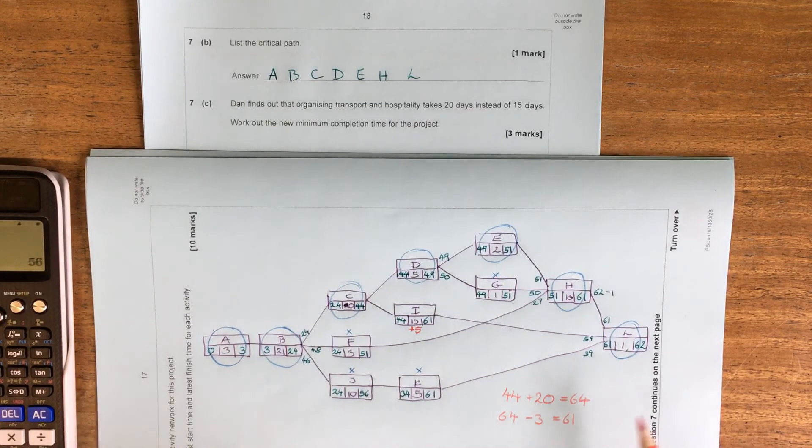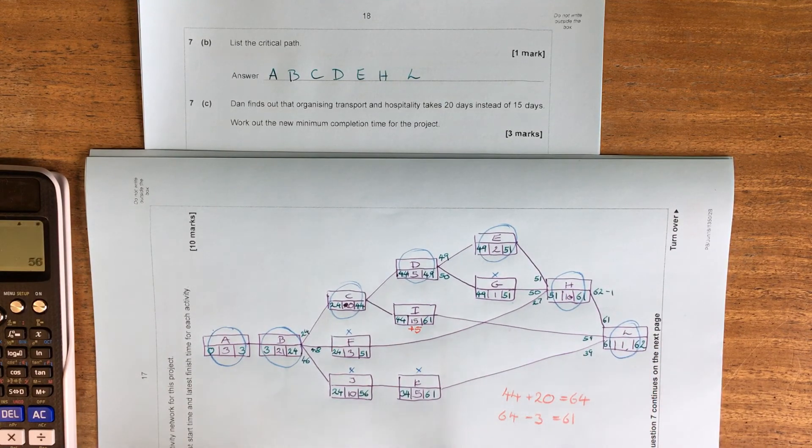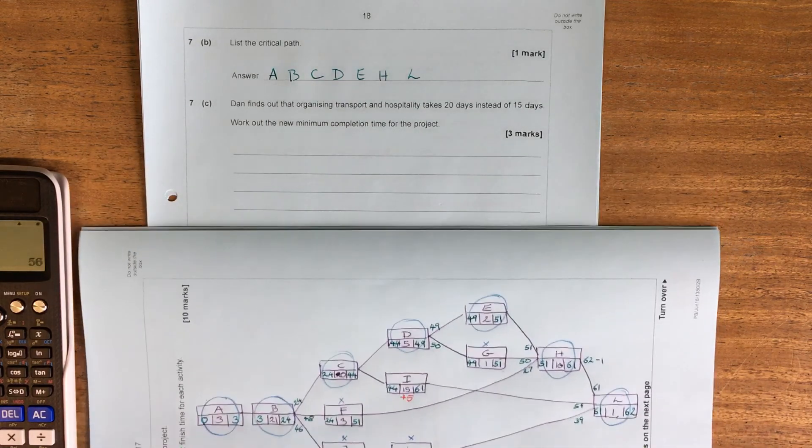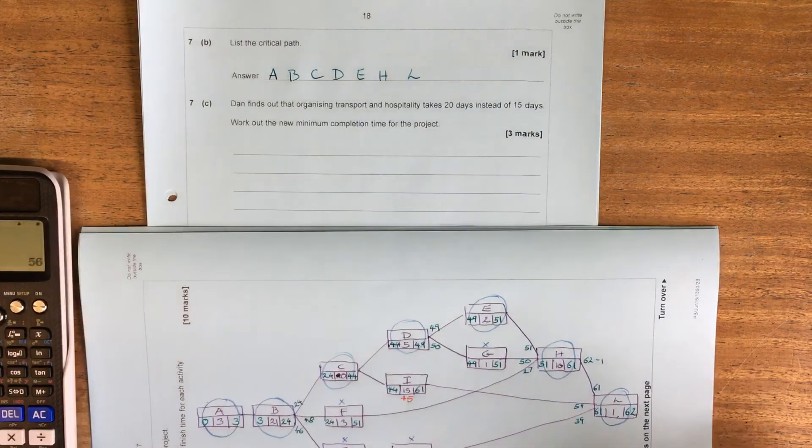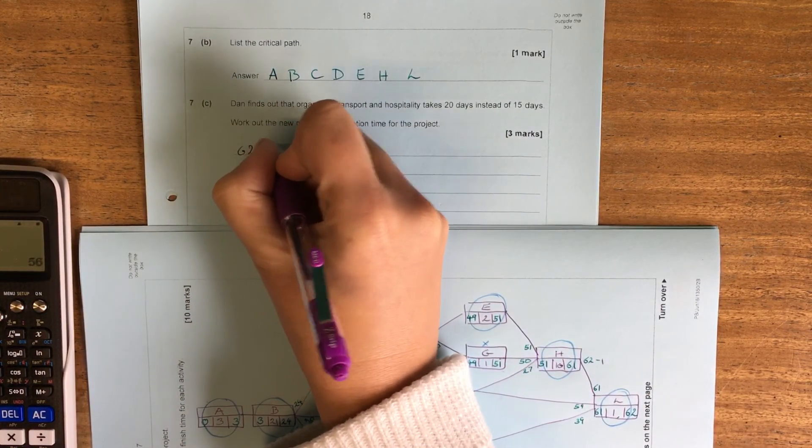So our new maximum completion time isn't going to be 62. It's going to be three days later. So we should have a new minimum completion time of 62 plus our three day delay, which gives us 65 days.